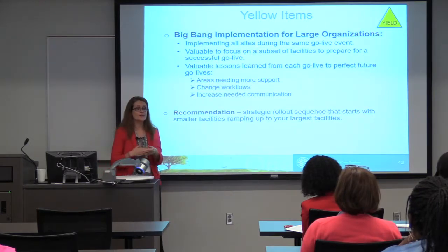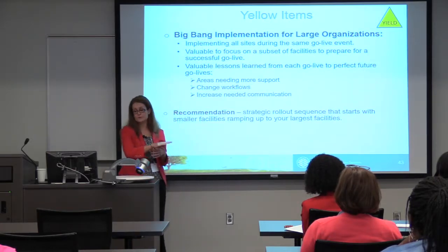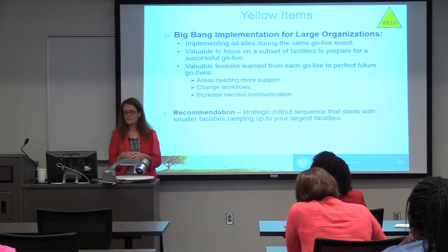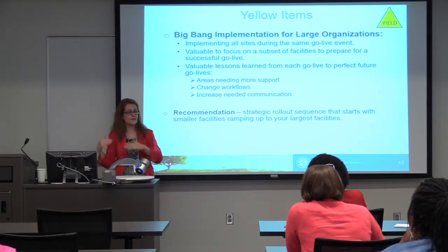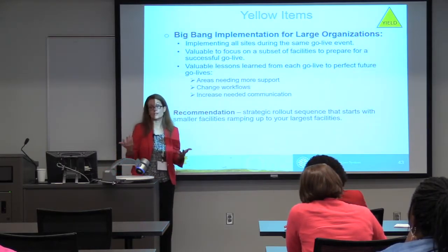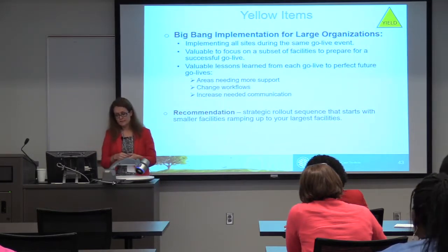So we are going to make sure we have plenty of support on the maternity floor, based on what we found out at University, for example. We've even had to tweak our workflows. What we did for maternity at University is nothing like what we do now, based on what we learned at that facility and how they helped us develop the software, which was better for everyone. Of course, everybody's talked about it today.